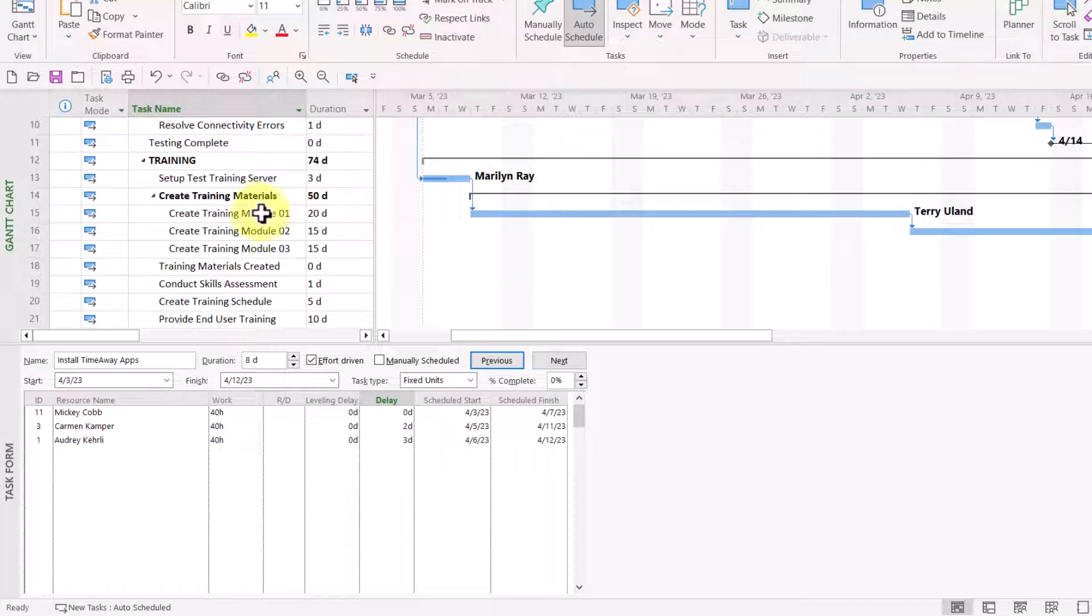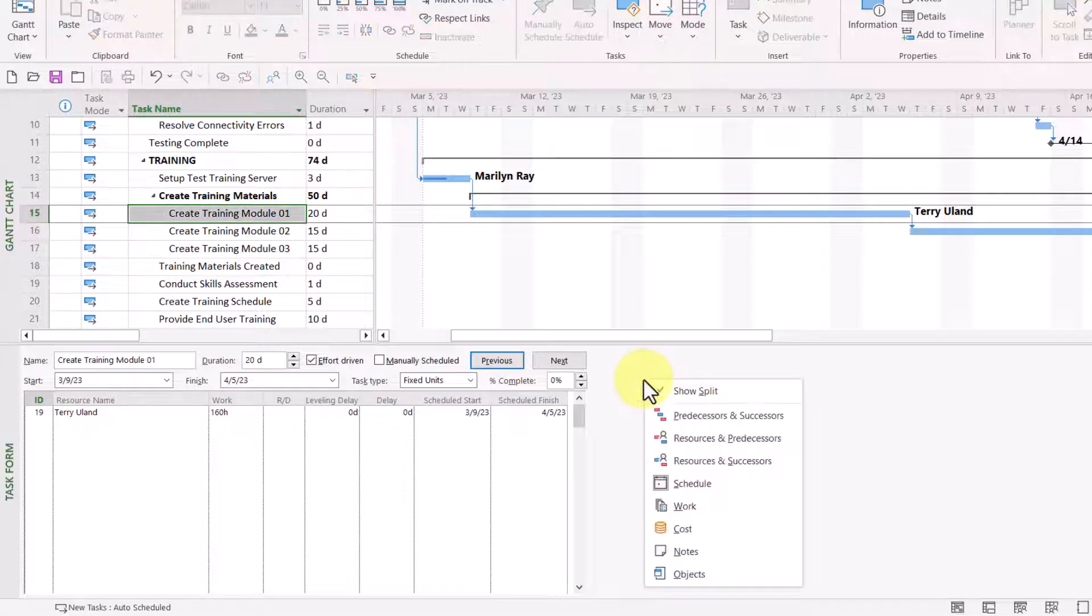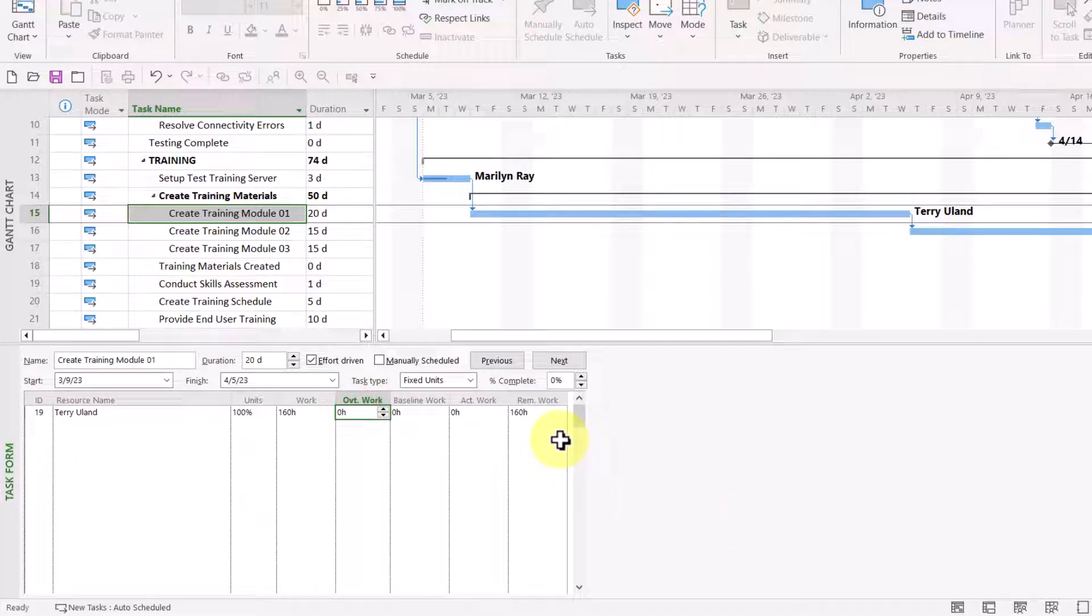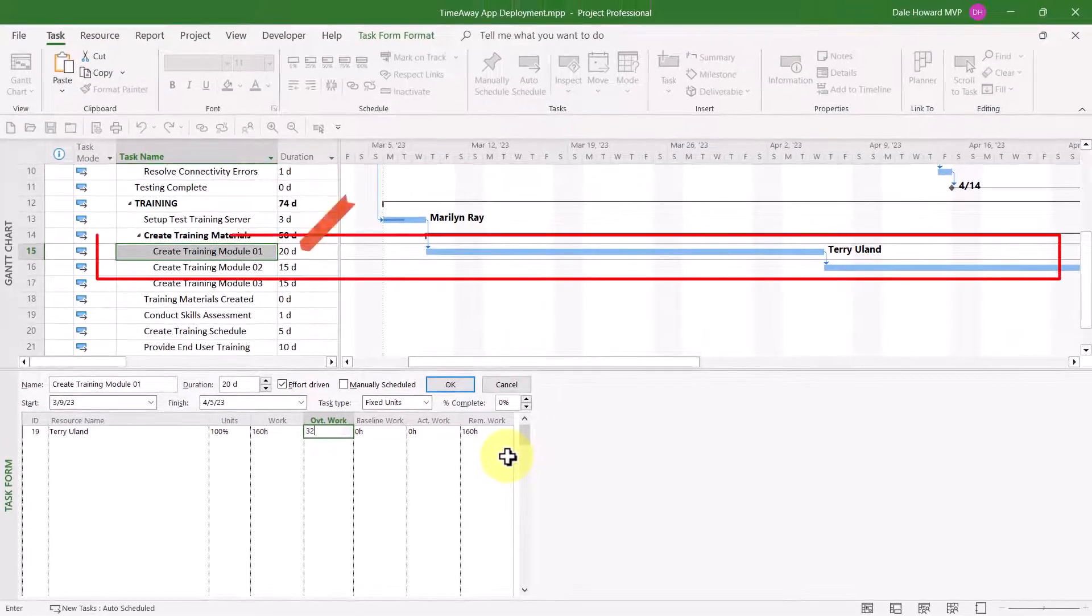Now, let's scroll down here to another task, Create Training Module 01. And let me bring up another interesting set of details known as the work details. The work set of details is useful if you need to plan in advance for overtime work to be done on a task. That is my situation entirely. I have Terry Uland assigned to this task. He's working full-time for 20 days. That's 160 hours of work. That's full-time work. But we've absolutely got to get this task done sooner. In this overtime work column, this is where I can say how many extra hours we want Terry to work on this task beyond the normal eight hours per day. I'm going to say we need Terry to work 32 hours of overtime out of the grand total of 160.